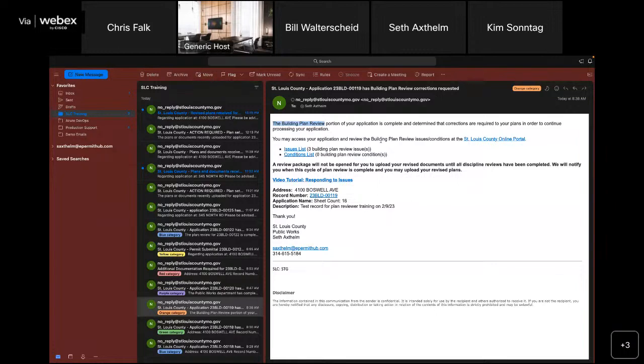And any new issues that they may have found based on your resubmittal will also be released to you in a status of open. And it's only when those issues are in the status of open that you have the ability to respond to those issues. So those will be released to you.